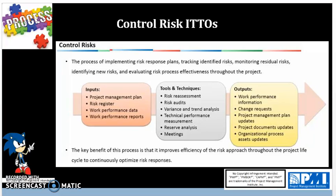Work performance data is a raw observation that is always going to be an input to any controlling process and will yield work performance information, which is data analyzed in context. That is a hallmark for all controlling processes, with the exception of monitor and control project work and perform integrated change control. The next input is the work performance report, coming from the monitor and control project work process, which takes into consideration status reports for any new or existing risks that need to be controlled.